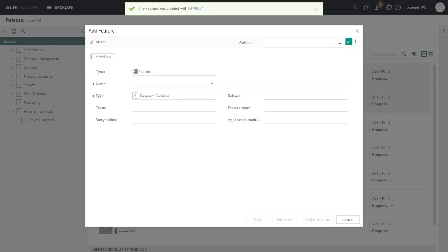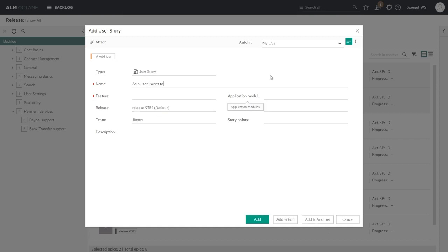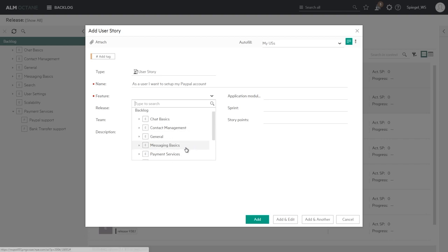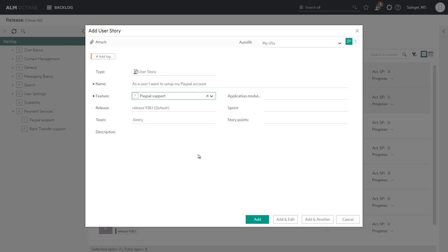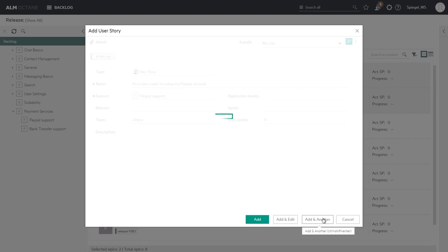We can continue to add to further break down that content into stories. Here we see that it is pre-populated by a template that I've created earlier. So I get the name with its prefix and release and team already set. So I can continue to set up my user story: as a user I want to set up my PayPal account. I can link it to that feature of PayPal support. I clear data that I don't need necessarily. And I can give it its weight in story points. That's not a required field at the moment, but I can do that.